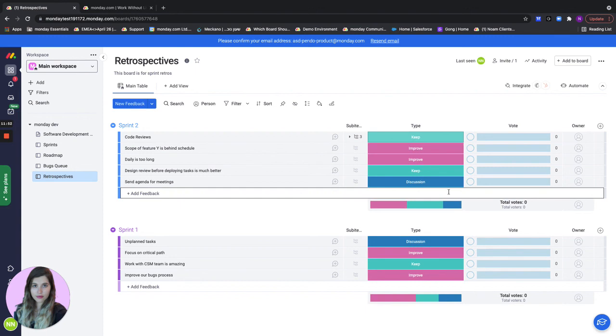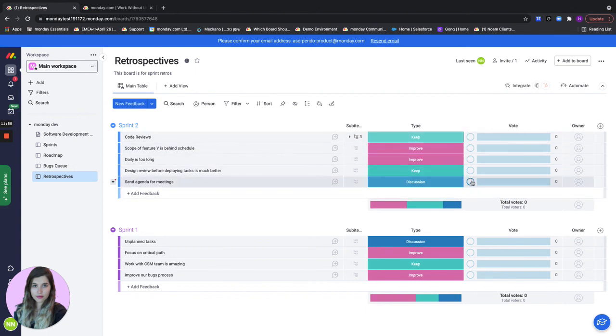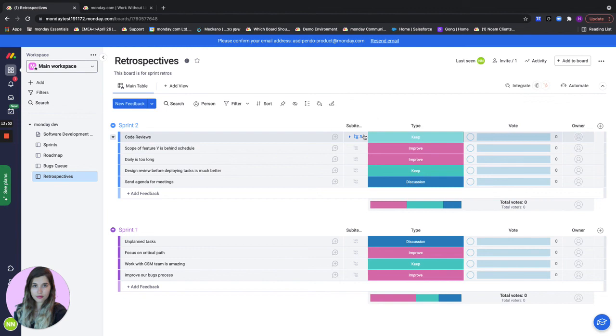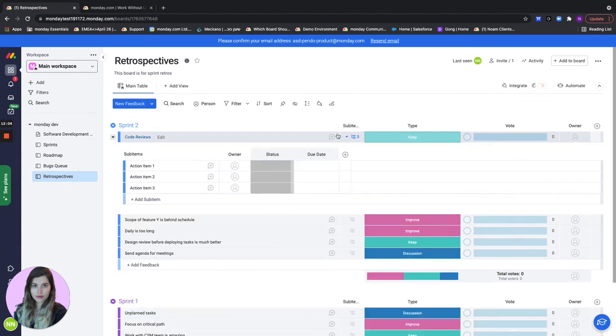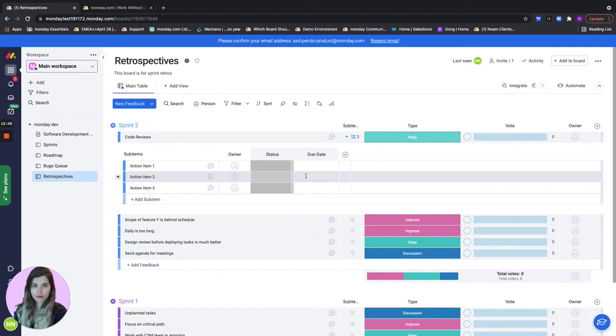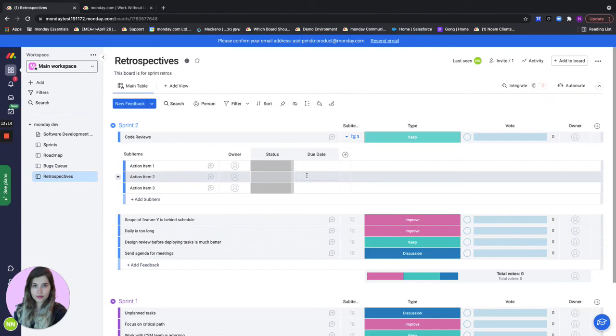Choose the type whether it's something to keep, a discussion, or something to improve. The team can take some time to vote on all of the different feedbacks added and then once the team members have voted we can go ahead to the ones that have been voted on the most and actually discuss them, maybe add some action items, put owners, put due dates, just to make sure that we're actually going to take care of this feedback and not leave it behind and make sure that we're getting better for next time.